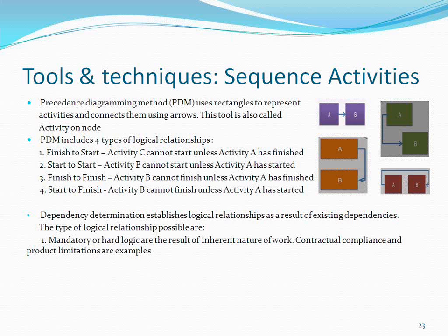Finish to finish. Finish to finish is you cannot finish the successor activity unless the predecessor is finished. Have you finished testing? No, they have not finished designing. If they finish designing, I will finish testing. So if you want to finish your work, you are dependent on some other work which they are supposed to finish. That is called finish to finish. These three are very much used in project management planning. But there is one more relationship called start to finish, very rarely used.